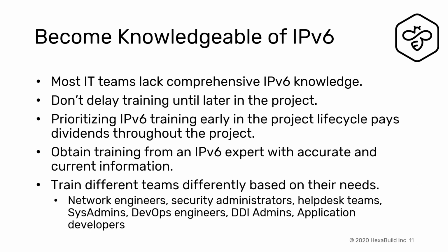Yeah, I can't agree with you more, because I've seen a lot of organizations decide they want to do a big bulk of training up in the beginning, and then you have help desk and systems folks, but the network team hasn't even started to deploy anything, and it's going to be 6 months down the road before they can even touch anything. They're going to forget everything that you taught them in that class by the time it comes to actually do something. I think we've all seen that. So you need to have training that's appropriate at the right time for when they're going to get it.